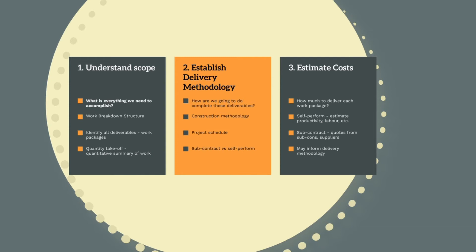In step one, we need to work out everything we need to accomplish to complete the project — what is everything we need to do to finish and hand over the project to the client? This involves creating the work breakdown structure and identifying all the unique project deliverables. These will be summarised into work packages. Next, we need to do a quantity takeoff and determine for each work package the quantum of work to be completed. For example, if we have a work package for subsurface drainage pipe install, how many lineal metres of drainage are required?